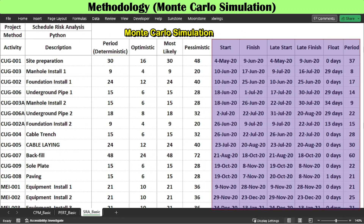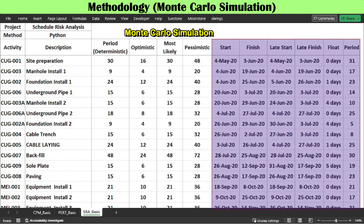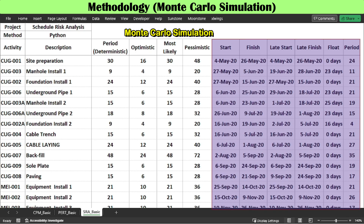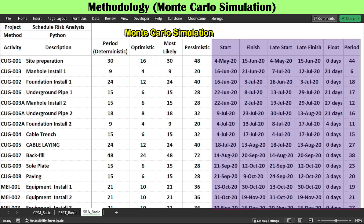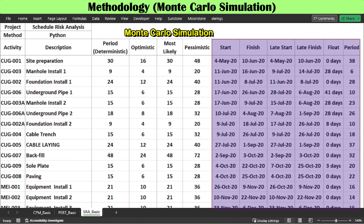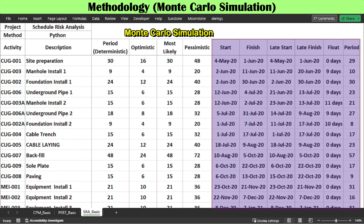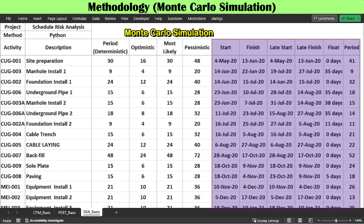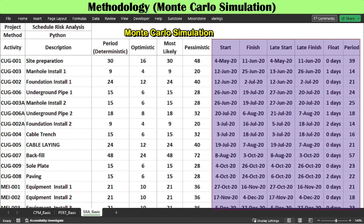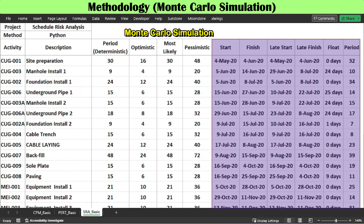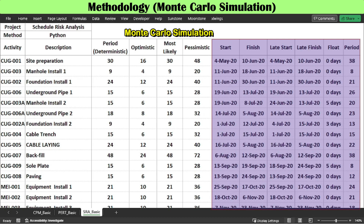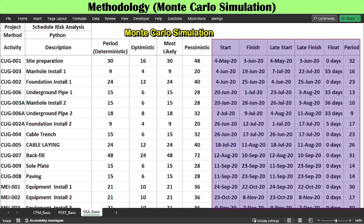To determine the entire pattern of possible completion dates for the project and its important milestones, the risk analyst iterates the project many times — say, 2,500 times — based on randomly selected activity periods. At the end of each iteration, the completion dates for the total project and for any important milestone are collected and stored.